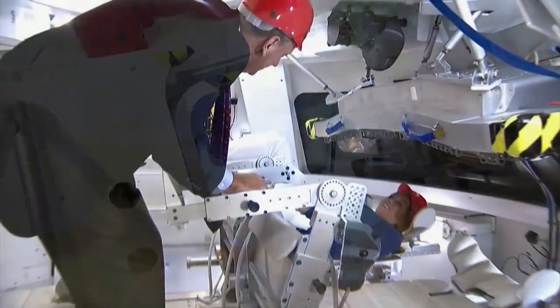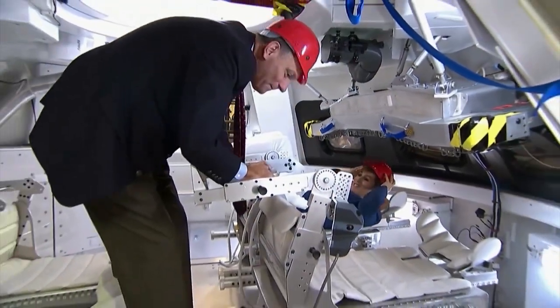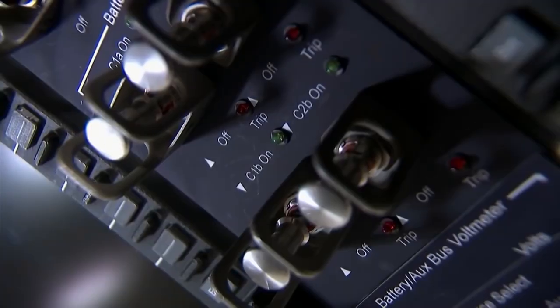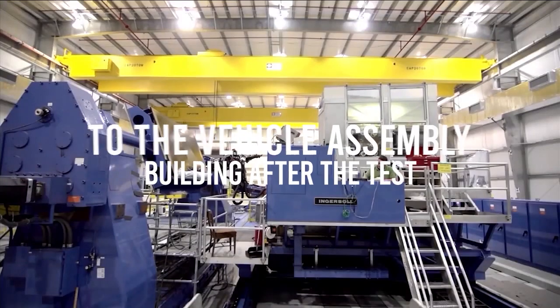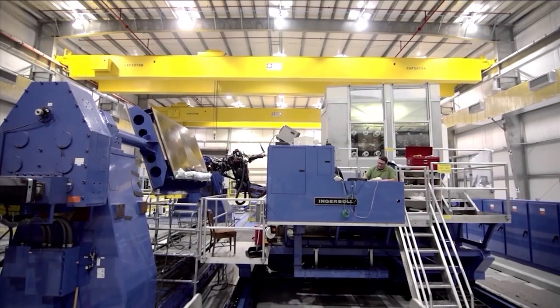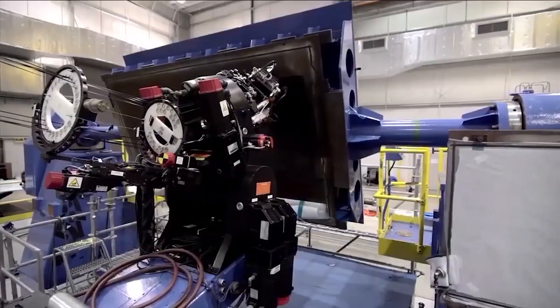The SLS will not stay out for very long, as the agency aims to roll it back to the vehicle assembly building after the test. From there, crews will remove rehearsal sensors, top up batteries.